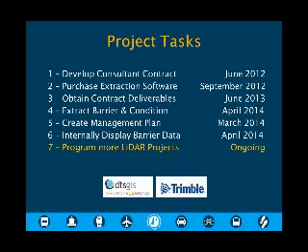The project budget was $250,000. That did not include internal staff time, but it did include software and 2 computers. So like I said, from start to finish, it took about 2 years to complete. But I have to say, even though everyone wants to move to Minnesota because of the climate, this project took a little bit longer because of the weather. We had a crazy winter, 2013, right? Yeah. So here are the project tasks and end dates for each task.